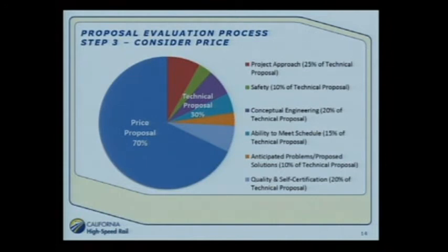By creating a competition for the technical piece, we think we're going to get strong technical proposals, and we're going to get some very well thought out plans from these proposal teams. And we're making it very competitive because if you're not in the top 3, you'll be dropped off. And then we move to the price, and because it's more heavily weighted in price on this second phase, we think we'll get some very good competition and get a very fair and reasonable price.